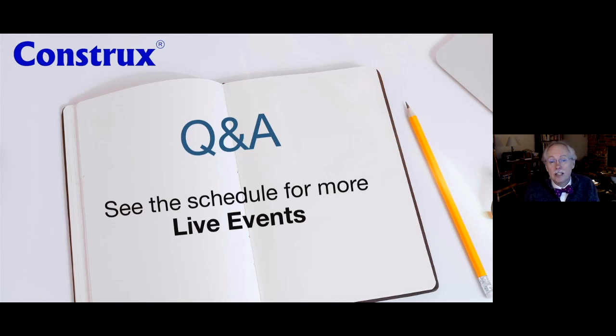So someone has attended some of my training or watched my estimation class. I often say a good estimate should only take 15 minutes, because if you're using a gut estimate, it's almost instantaneous. If you've already decided your multiplier at that point, that's simple arithmetic, right? And then if you're going back to saying, well, I got my promise, I got my best, what's my most likely? We're back to guessing again.